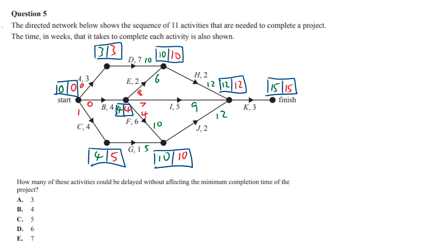Now, if you've seen my previous videos, and of course you have, you might notice that I've criticized the technique for critical path analysis, because normally what you do is you look at all the ones that have equal numbers, and that means they have 0 float on them. Now we do know there's two critical paths because of these little red zeros, which they don't often talk about. So we know there's a critical path that goes like this, and another one that goes like this, and goes through K as well. But when you look at this, it looks like E at the beginning only has 4 and 4, which says it has no float, but we know there's a difference of 10 and 6 here. There's quite a big float on that.